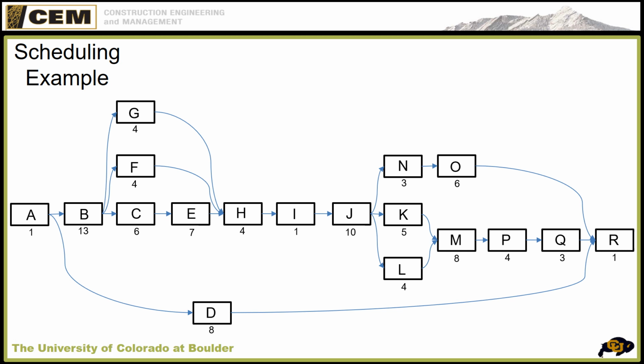Okay, so that was step 4 on your sheet. We did our network diagram. Now we need to do a forward pass to determine the early starts and early finishes for each activity. So that means we start on the far left, and we start with the end of day 0. Always start with the end of day 0. That's a common mistake. You'll want to start with 1. We start at the end of day 0.